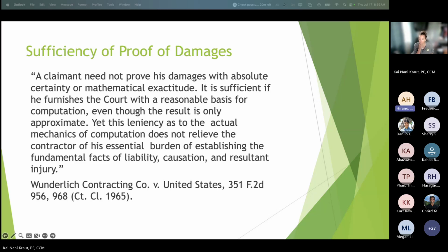For a unilateral change, is there a cost estimate or a not-to-exceed amount, such that if the contractor doesn't submit a claim within 30 days, he still could get some compensation or not? Yes. When we do unilateral, our process requires justification of cost. So we would base it on our estimate, and that would be either lump sum, like you said, we could create a force account, or unit price, any of those things. Yes, there's a cost component. Our backup would be to substantiate our cost.